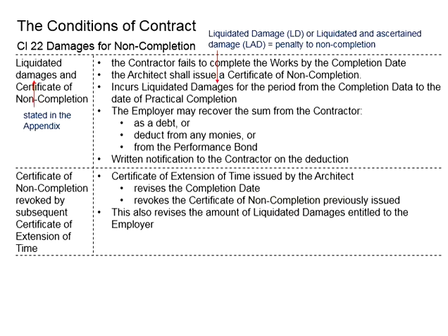It is only when the project overshoots the new completion date that there will be a new certificate of non-completions. Now the liquidated damages shall trigger again.